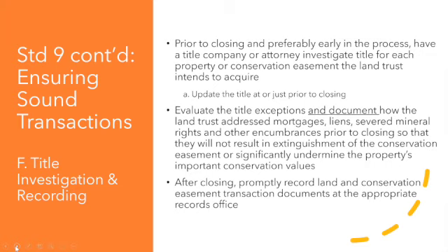Sometimes it's the organization's own access to the property, which might be complicated and need further investigation. So if you're looking at a property for the development of a trail, but your access to the property is from a roadway managed by a homeowners association, for example, you want to make sure that you're going to be able to bring the public over that roadway, over that access, and figure that all out before you actually take possession of the property.